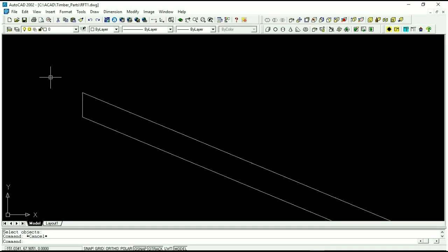So not only does it determine what lumber sizes you need for the actual job to order from the lumber yard, you also have material cut sheets that you give to guys out in the field so that they know exactly what parts come from what pieces. And it makes it more efficient, and you're not chasing material around, and they're not making their own decisions. And then everything ends up working out efficiently. So it works out for efficiency's sake, and it works out for production's sake because it's a lot quicker.